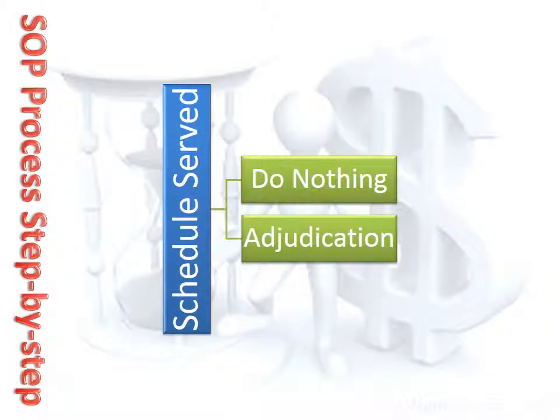If the client serves a payment schedule, they would have stated in the schedule what they are prepared to pay, and if not the full amount, why they are not paying the full amount. The contractor has two options here. The first is if the contractor accepts the reasons the client has offered for payment or part payment or non-payment, then the contractor can wait to see if the client pays as stated in the payment schedule, and the matter is then at a close.